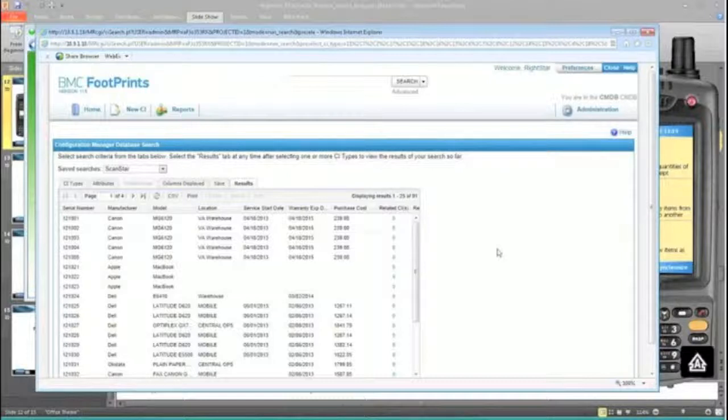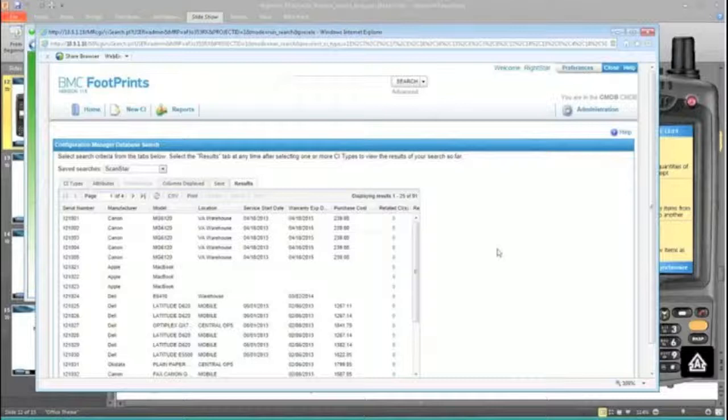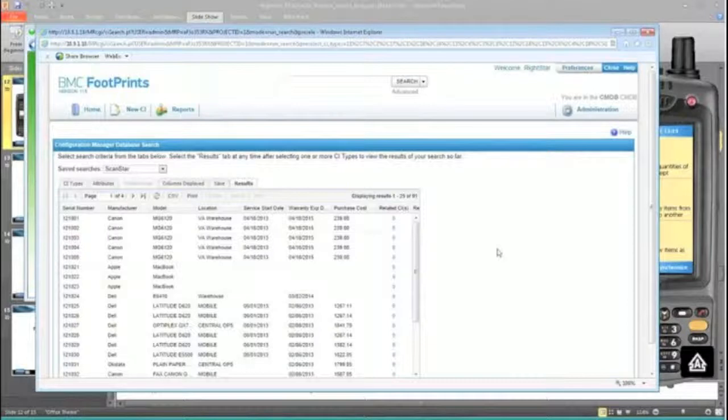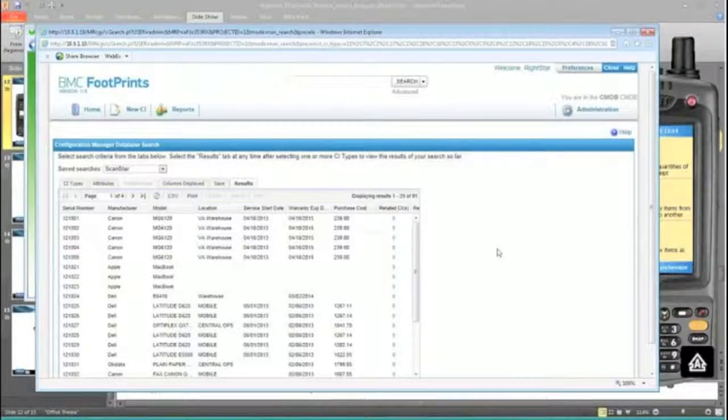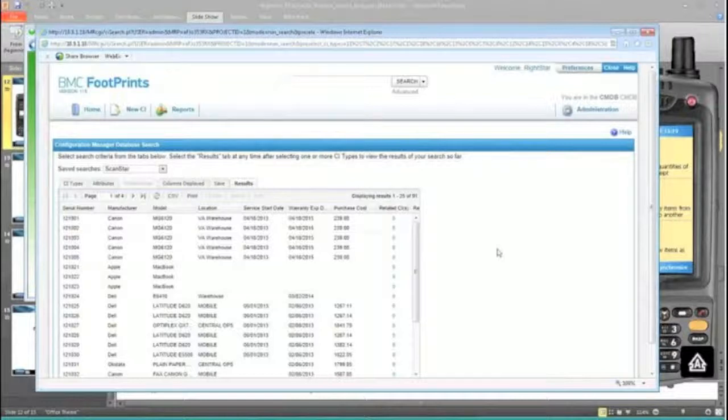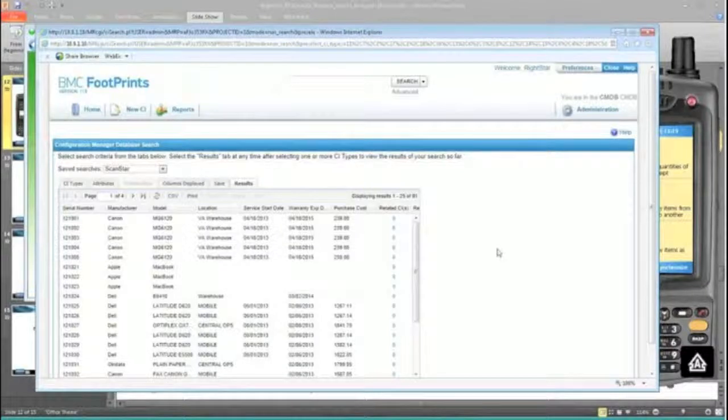To set up your CMDB and start doing your service catalogs, you can figure about a week. The first one took two weeks because you got a week of just basic training of understanding how to set footprints up and create the users. Then each one of your modules, in that time frame of a couple of days of planning, probably three days of implementation, using the approach of we'll sit down with you, help you plan it out, and then you can kind of build it. We'll teach you to fish. That's basically 40 hours per workspace.